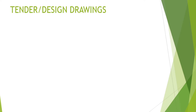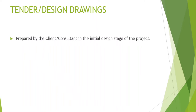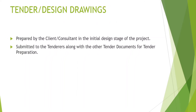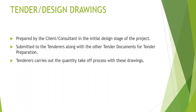Tender or design drawings. These are the first set of drawings in the tendering stage of a construction project. These drawings are prepared by the client or the consultant appointed by the client in the initial stage of the project. Once these drawings are ready, they form part of the other tender documents and all the tender documents are submitted to the prospective parties who will be bidding for this project. The tenderers utilize these drawings to carry out their quantity takeoff process and to finalize their offer to carry out the project.